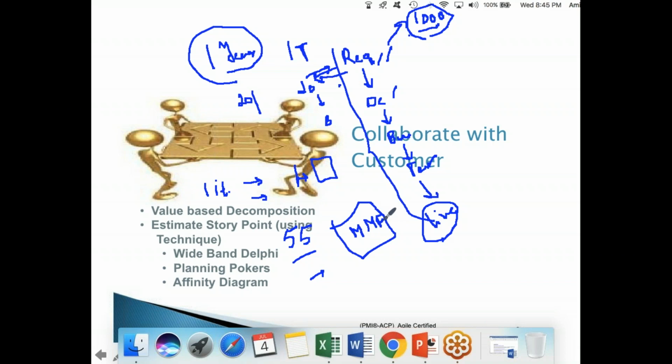Let me take the example of a project where you are building a bicycle. In a bicycle, which are the most important parts with which you can start using the bicycle? Two tires are important, brakes are important, the skeleton is important. Painting is not important for you to start using it. The carriage to carry the luggage at the back is not important. A horn or a bell is not so important. Or some look and feel aspects for a bicycle, people put some sort of designs and all, it's not important.